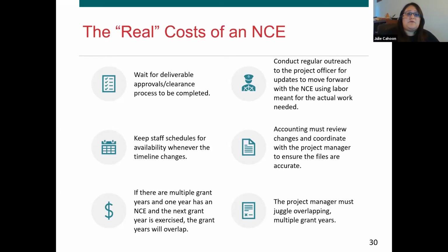Another one is if you have multiple grant years occurring at the same time, and this will impact the management of your project as well as the staffing. It becomes complicated and it can overwhelm staff if you have one grant year that was supposed to end on X date that is now moving into the next grant year. For that extended period, maybe it's 2 months or 3 months, you have two concurring grant years going on, and you're completing work on one while starting work on the second grant year. And so that can be difficult to manage oftentimes, and then it also can be difficult for your staff to manage as well.